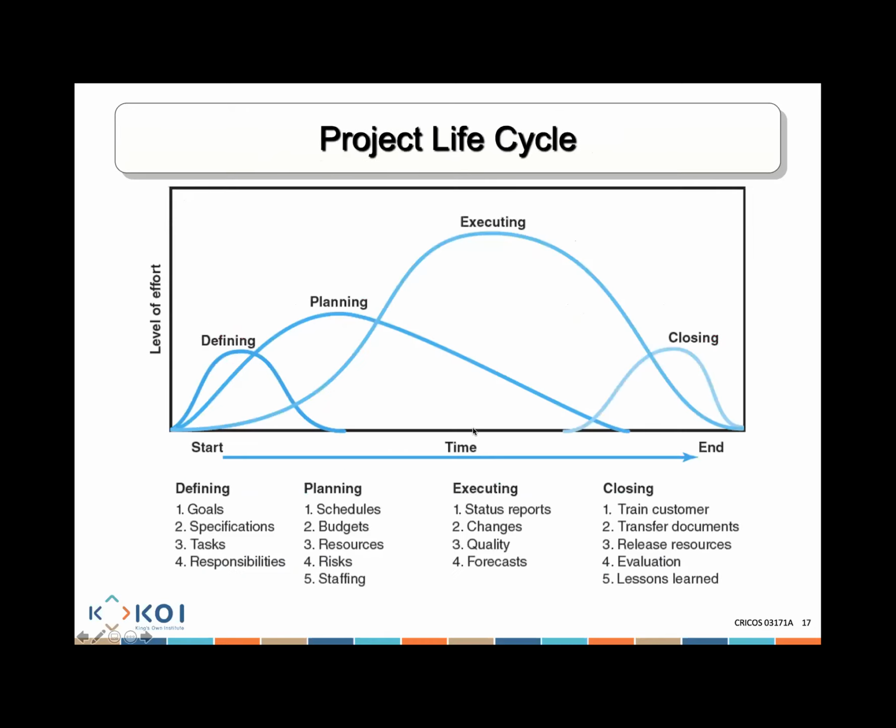Guys, when we talk about projects, we talk about how we deliver them. And when we talk about delivering them, we have all of the stages. We have a defining stage, planning stage, executing stage, and closing stage. Defining stage happens all the way at the beginning. We need to understand what we're doing and why we are doing it. So when we talk about the beginning, we talk about defining. What are we going to define? I need to define my goal. I need to define my specifications. I need to define the tasks that I need to do. I need to define all of these responsibilities that various people are going to have to be able to get the job done.